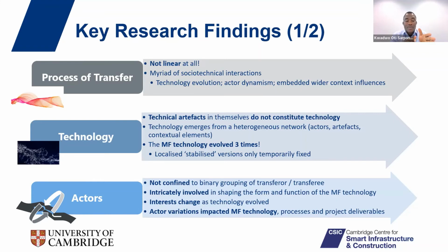And so from that point onward, the configuration of the parts that were used was changed because the connections were changed to make them tighter, and the panels themselves were redesigned to make their midsections stiffer. At the end of the day, the localized version that was used is not what was initially designed.